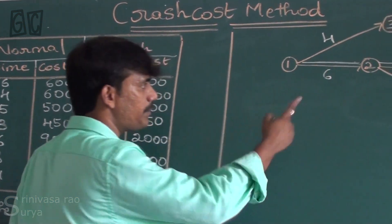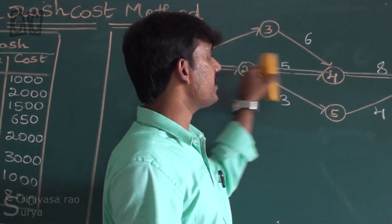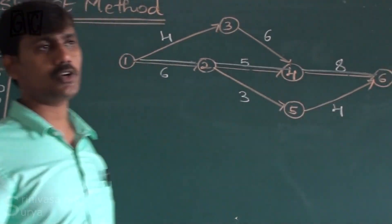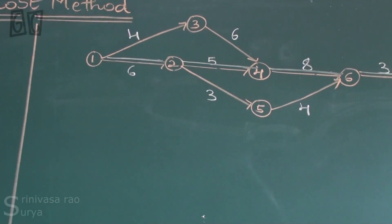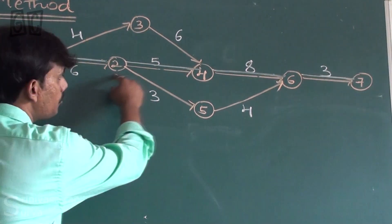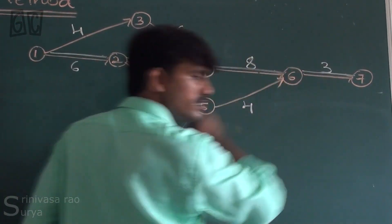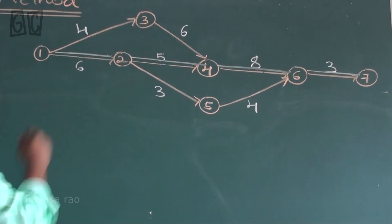The CPM path is as follows: the critical path goes through nodes 1 to 2, 2 to 4, 4 to 6, and 6 to 7.